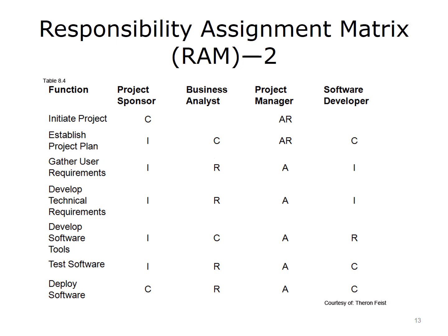There are various ways to approach and format a responsibility assignment matrix. One of the most common is called a RACI matrix. It provides more detail on the roles of each responsibility assignment. In the example above, letters are placed in the columns instead of X's, providing a bit more detail on the responsibilities of the person to the corresponding activity.